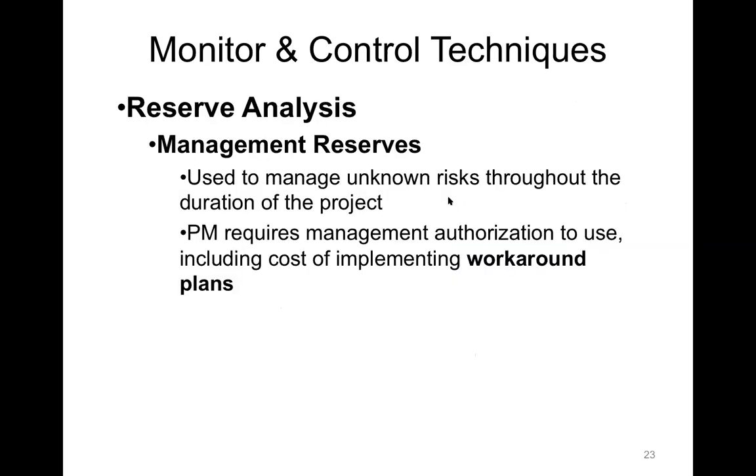So that's reserve analysis. Now, management reserves are used, as I said, to manage unknown risks throughout the duration of the project. The project manager actually requires the authorization of the sponsor to use the management reserve to cover the cost of implementing those workaround plans. Remember, workaround plans are reactive plans to respond to the crisis of having an unknown risk now occur.